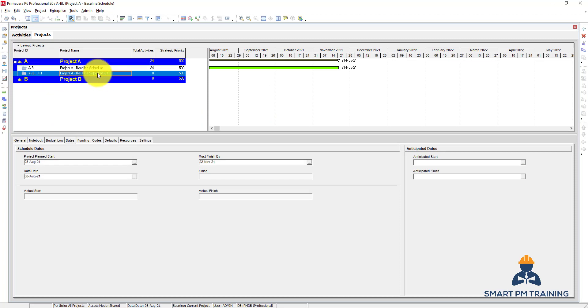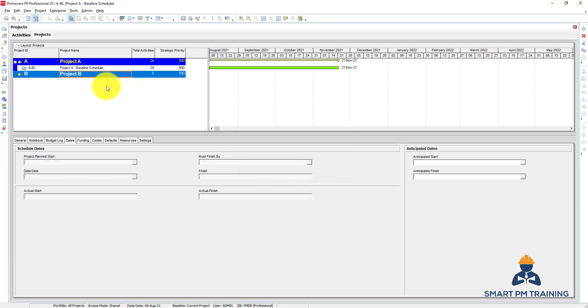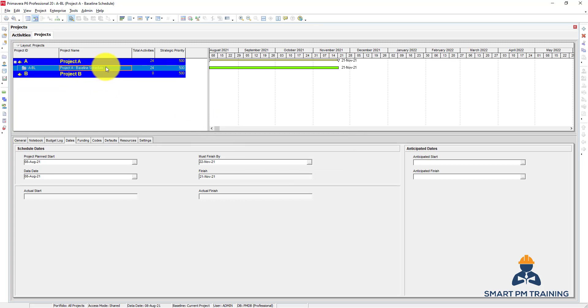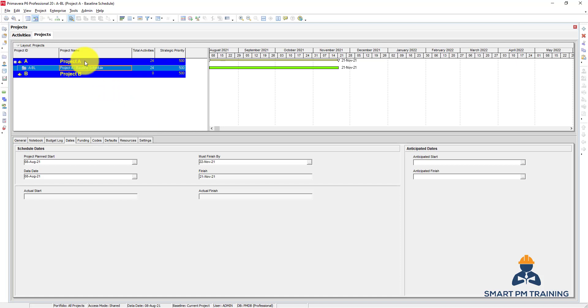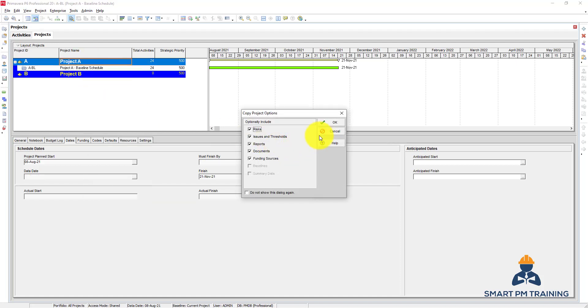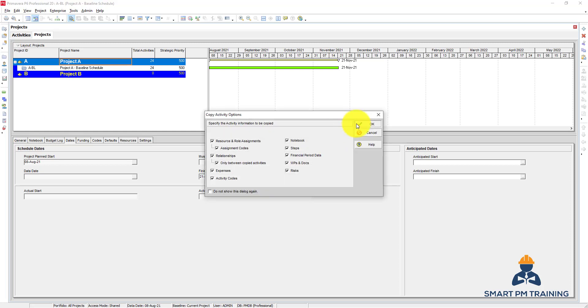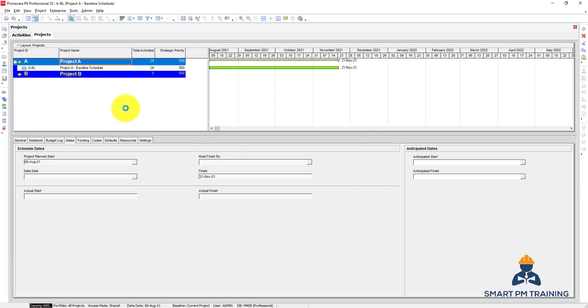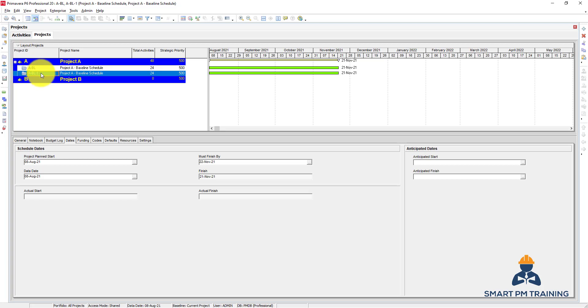But before I do this option in the first place, I can just delete the additional program. This is my baseline schedule. I take a copy of the program and paste. This is your baseline schedule. This is the additional program, the copy. So I will rename it as an update.